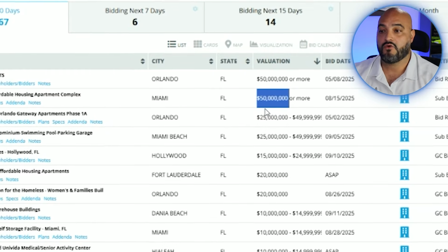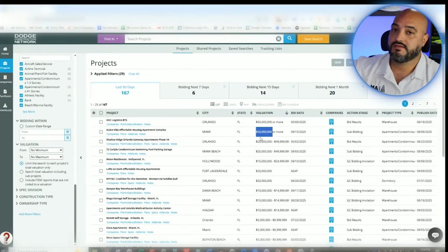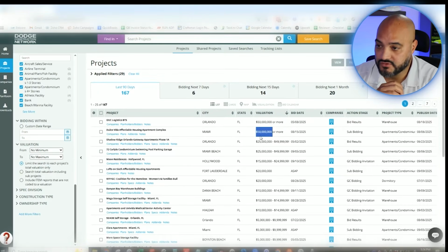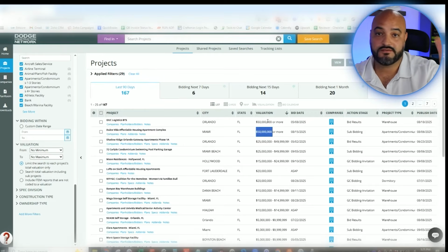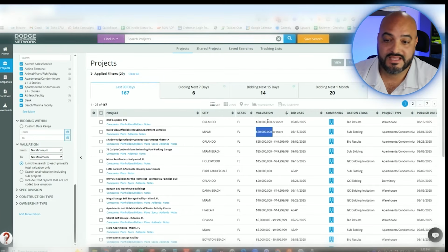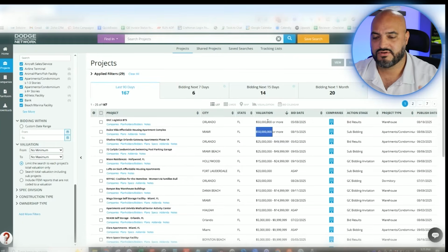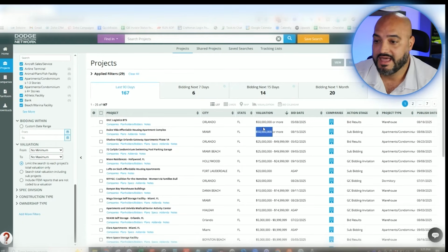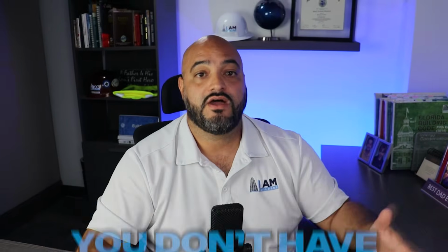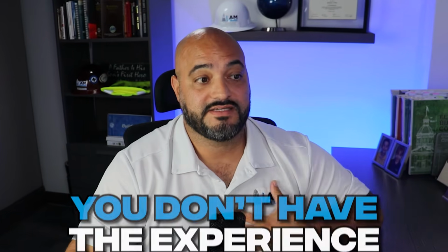So you have to be realistic on what you are going to pursue. What I typically say, if you're a one-man operation, you've got to look at your history. What are the types of jobs you're doing? So let's say you're a sub and you're doing, I don't know, $100,000 jobs. The rule of thumb is you take the valuation, which is the owner's valuation, and you multiply it by 10%. That gives you approximately, maybe 8%, where your trade might come in at. And that's what you're going to bid at. And I'll tell you why. Because if you're consistently doing $50,000, $60,000, $100,000 jobs, nobody off the bat is going to give you a $500,000 job. You haven't done it yet for them to have the confidence to give that to you. So we have to be realistic on what we can get.